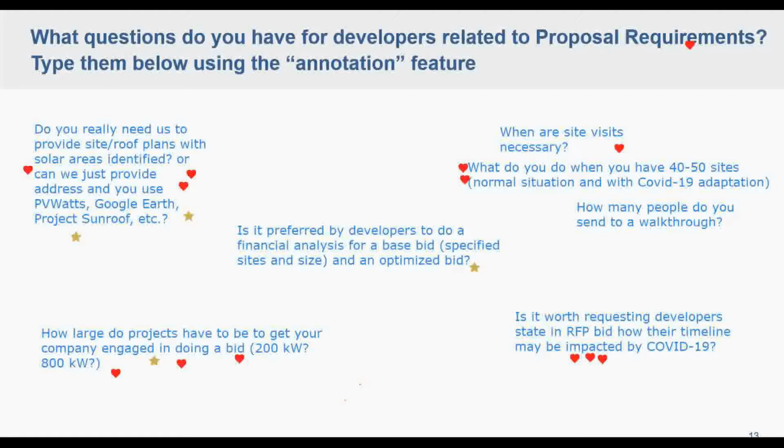Yeah, sure. I'll let Soul Systems, I'm sure they have a different opinion of when they prefer to do a site visit in a non-COVID environment. We normally recommend pushing to get site visits after we've awarded a project to a specific developer. All those awards are non-binding, but at that point, the developer is spending due diligence dollars, and we want to get them out there, figuring out if the project is real. In tandem, we're also negotiating any of the contracts, so we have both due diligence and contracts happening in tandem.